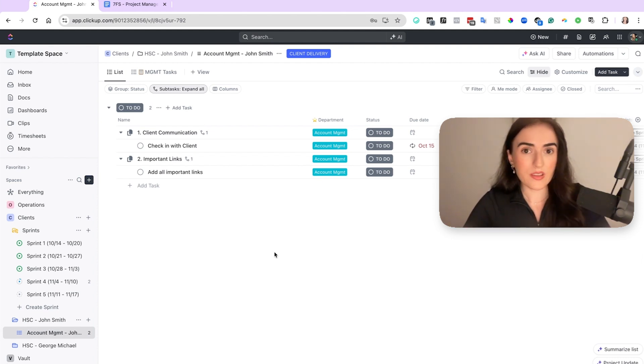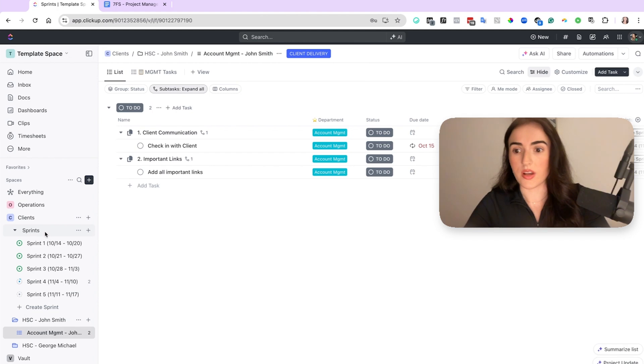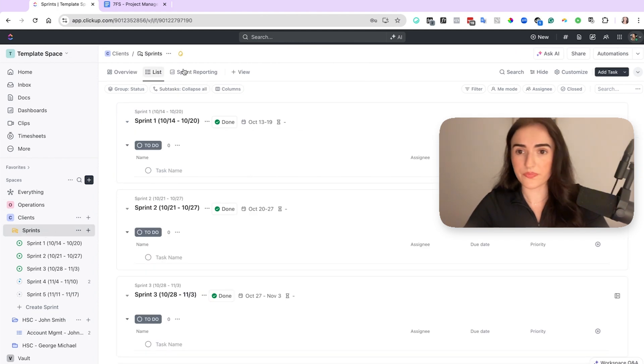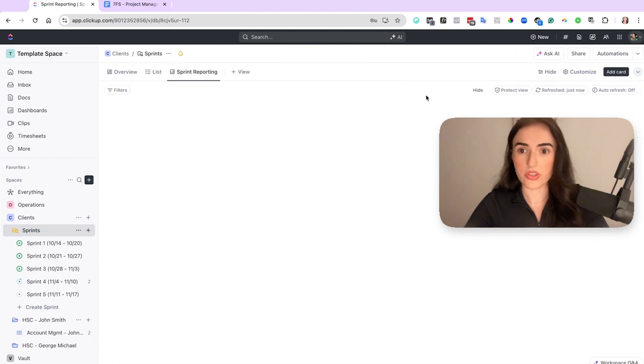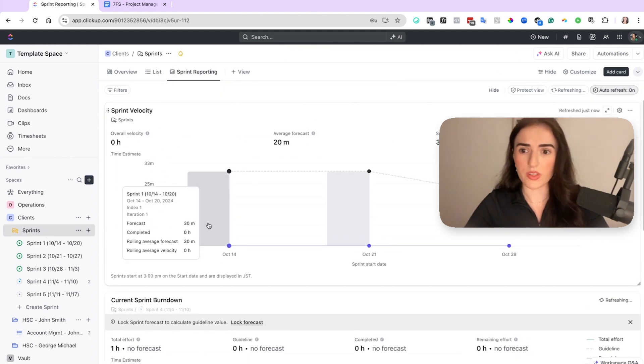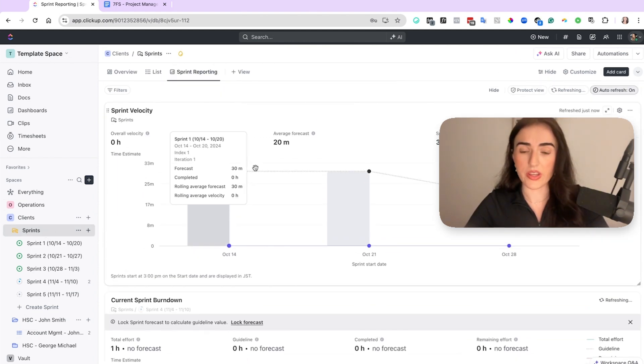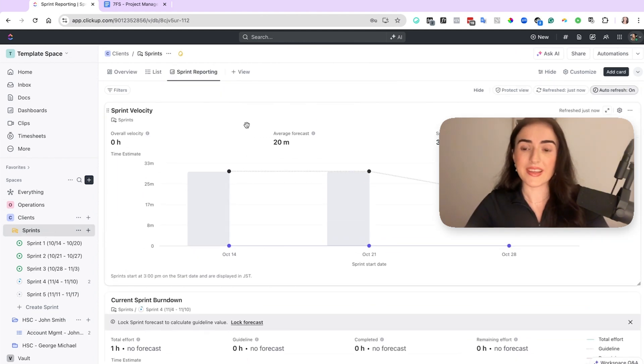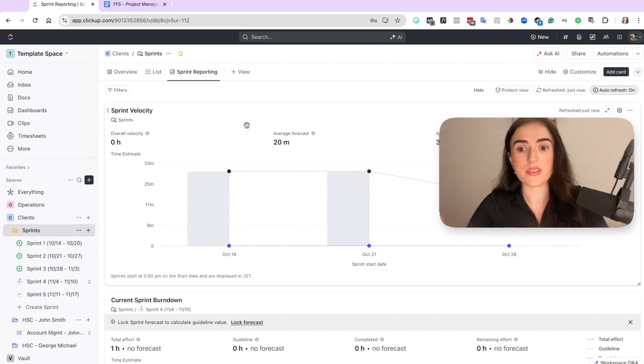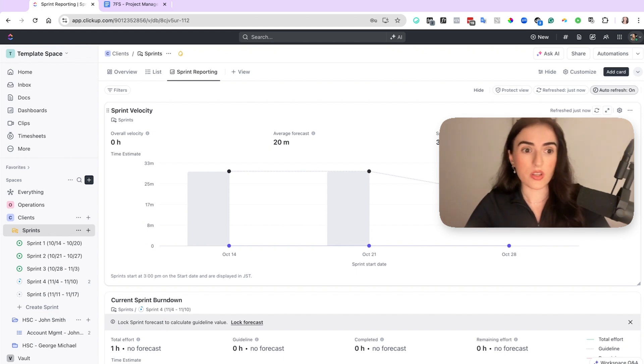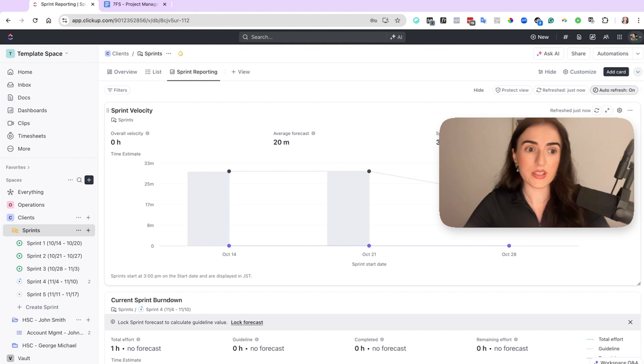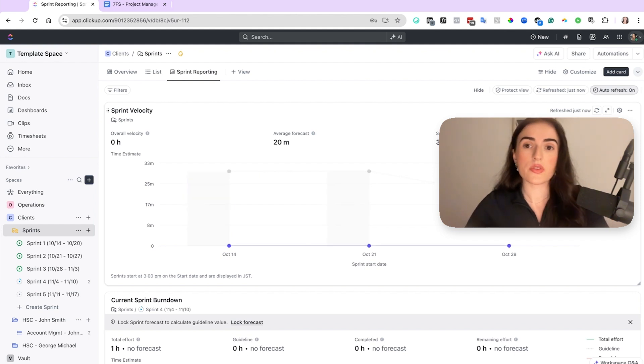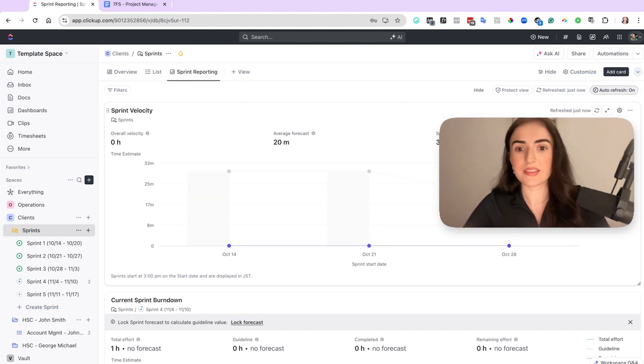For that, you can also use the velocity chart, which allows you over here to check with the velocity chart. You can check how many tasks your team is completing every single week. The velocity chart allows you to see how many were forecasted, how many were completed, and then the rolling average velocity. So then you know on average how many tasks and how many hours your team is working every single week.